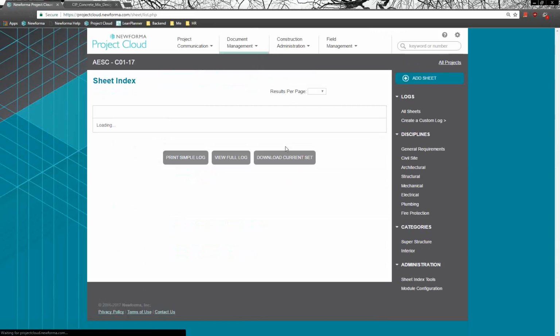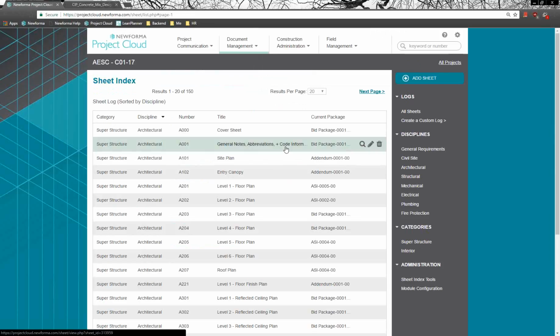As far as managing the drawings, think of this as an electronic version of a filing cabinet. The idea is that as a team, if we weren't using this system and just had that filing cabinet, we would say, if you want an official version of a drawing, it's not the thing attached to the email that Alex sent out. It's not the thing that Taryn has printed out on her desk. You go to the filing cabinet, you open it up, and there's a folder for every drawing. You open up the appropriate folder, and now you're going to see every official version of that drawing that's been put in there over the course of the project.